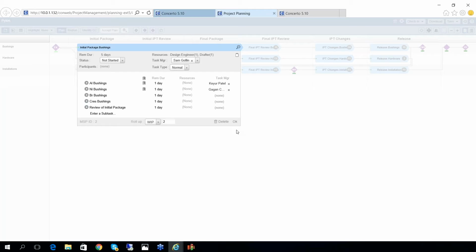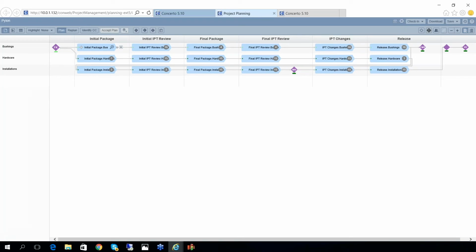When they estimate how long these tasks will take, the software can calculate, for example, the impact on the overall task duration, but we don't take that information automatically into the remaining duration update of the higher level task. So this is one example of how we have collapsed the details and contained them locally inside a task.